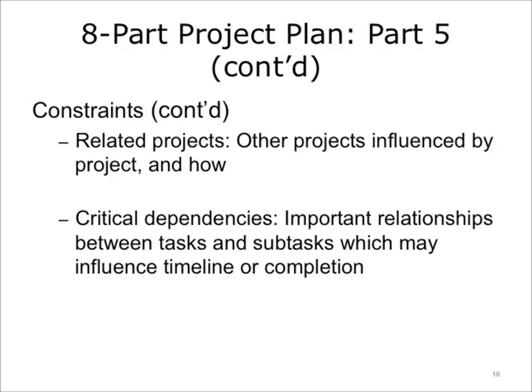Critical dependencies. Likewise, it is also essential that the critical dependencies between related tasks and subtasks, whether internal or external to the project, be understood to ensure that tasks are sequenced correctly so you can maximize efficiency, and so that the project can run smoothly, minimizing unwanted downtime. Determine the relationship between work performed in a given task or subtask with the work performed in other tasks or subtasks. Identify the predecessor and successor activities. Identify any tasks within a related project on which this project is dependent and describe each relationship.